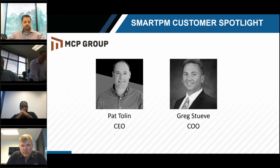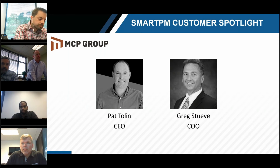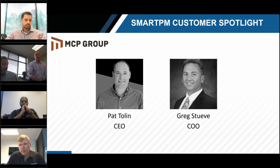So yeah, and I think another good example, Billy, is the project with one of our very best superintendents and one of our good project managers. Through SmartPM, we were seeing the schedule slip, and there were some weather things, some owner changes, things like that. But they kept saying, we're going to get this done. We can get it done. We'll hit the date. But then we did a couple of calls with you, analyzed it, and sat down with those guys and said, guys, here's what we're seeing. This isn't going to work. And some light bulbs went off. Then you ran in SmartPM a 6-day-a-week schedule and ran those analytics, and we were able to sit down with the guys. They started working 6 days a week, and we were projecting, I think, to be 30 days late, and now I think we're going to be done right on time.